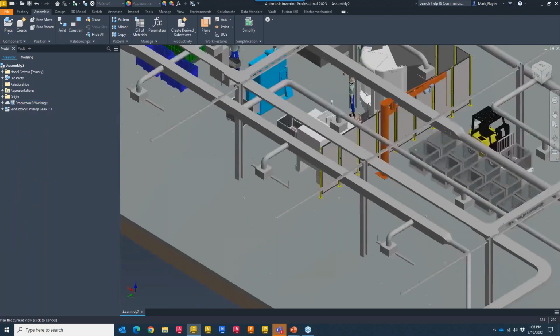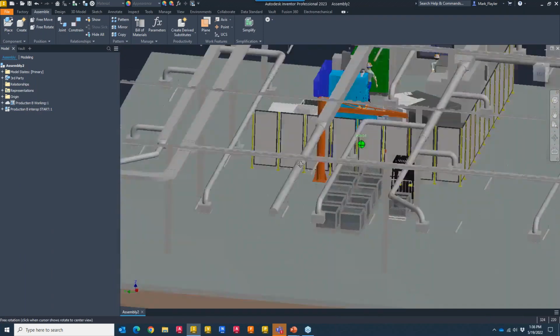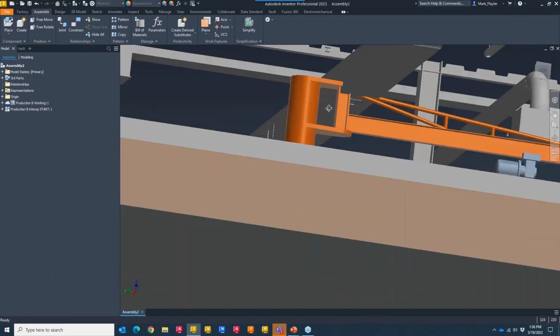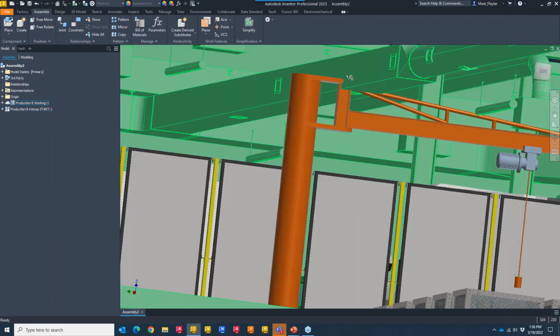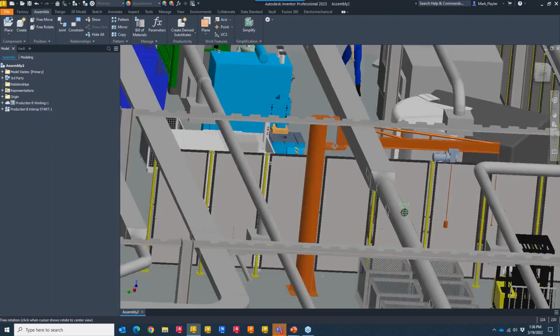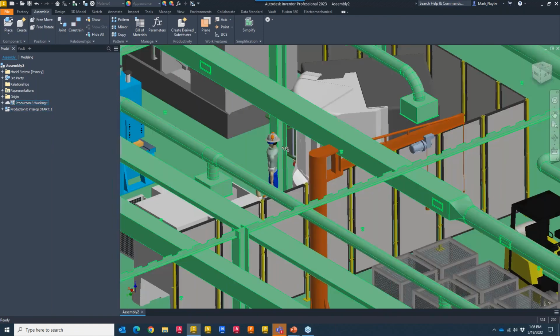Okay. So again, here I'm seeing some things going on. And one of the things that's kind of blaring to me right now is I do have a problem with the crane that I typically use for filling these totes. It's actually hitting the ductwork. Now, if we just talk about this for a moment in the grand scheme of things, one of our key takeaways today is understanding how these kind of problems can add to compensatory budgets. I'm not sure if you ever had to move HVAC ducting before, but that could be a $10,000 compensatory budget charge. It could be project delays. It can cause a lot of problems just by not having the knowledge of where this is.